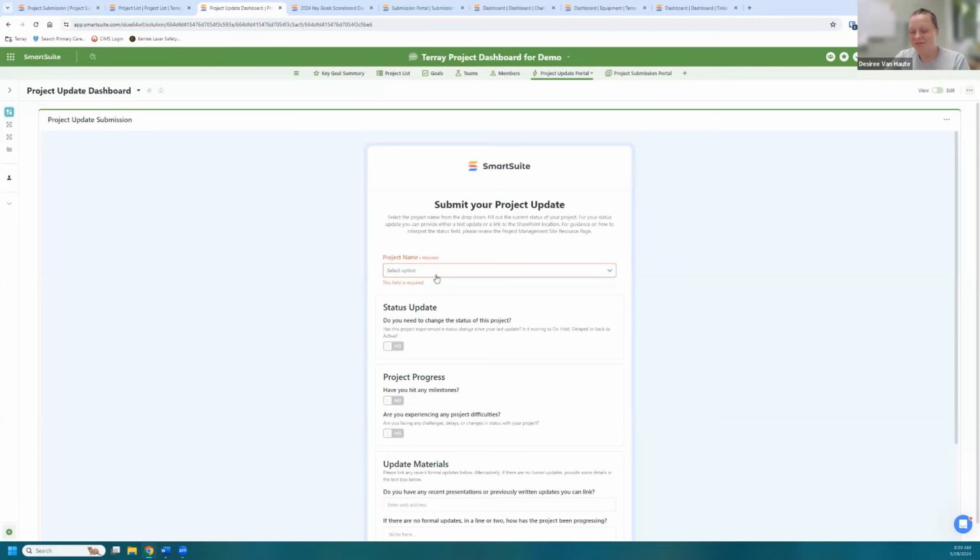We followed with, first, we did the completely manual where I typed everything up and we created the form. And I worked with each project lead and each manager across the organization to teach them how I wanted the form filled out. After that, I automated the emails. So I didn't start with automations as the first pass. I started with collecting the data, understanding how I wanted to collect it, moving into the form, and then automating the form.